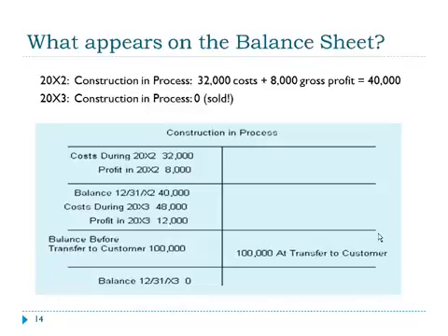That is not a coincidence. That is what will always be the case. We will be adding the costs and the profit to the inventory account, so that at the end of construction, the value in the construction in process account is exactly equal to the contract price. Then, when the goods are transferred over to the customer, we'll decrease construction in process and leave us with a zero balance in inventory. That's our normal sales transaction when we decrease inventory at the time a sale occurs.